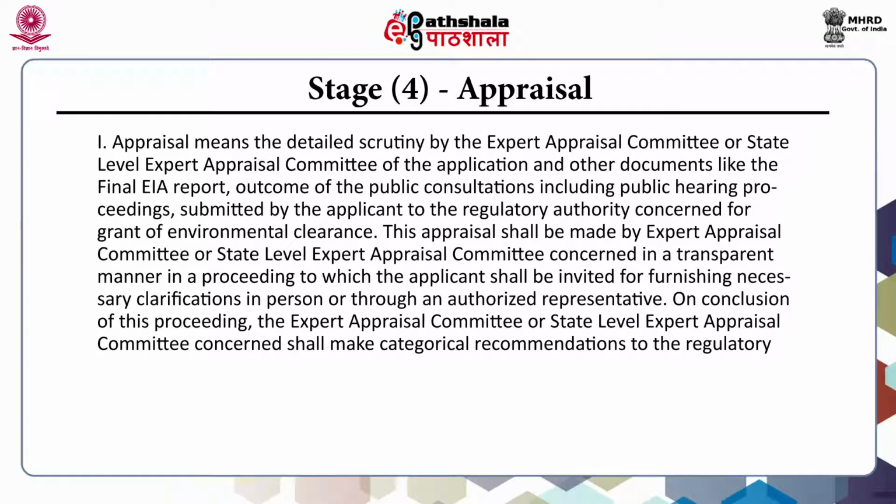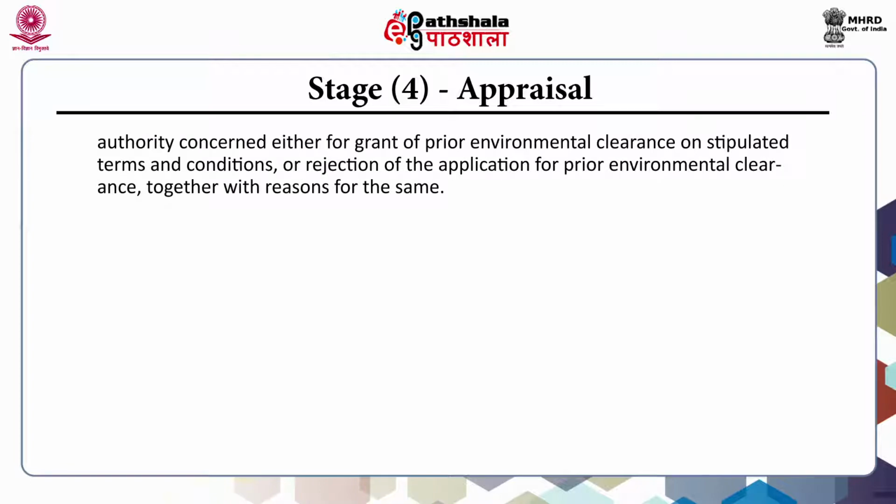On conclusion of these proceedings, the committee concerned shall make categorical recommendations to the regulatory authority concerned either for the grant of prior environmental clearance on stipulated terms and conditions, or rejection of the application for prior environmental clearance together with reasons for the same.